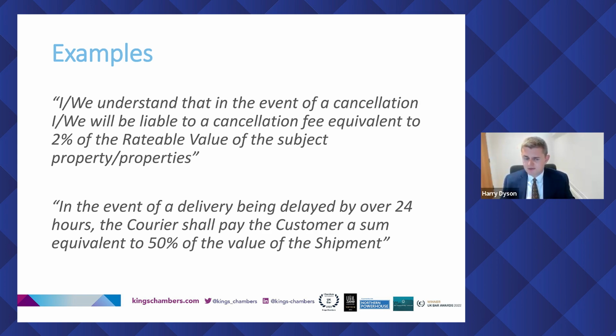And we had to look at the contract when it was formed, of course, at the time. There was nothing in the contract that said how long the works might take. So there was nothing that held the claimant to account on how long he might take to complete, nor were there any representations given by either side as to how long it might take. So in the circumstances, it really was open-ended, and I was able to capitalise on my submissions and say, look, there's no legitimate interest here whatsoever in holding the defendant to ransom for such a period of time and preventing him essentially from going elsewhere.